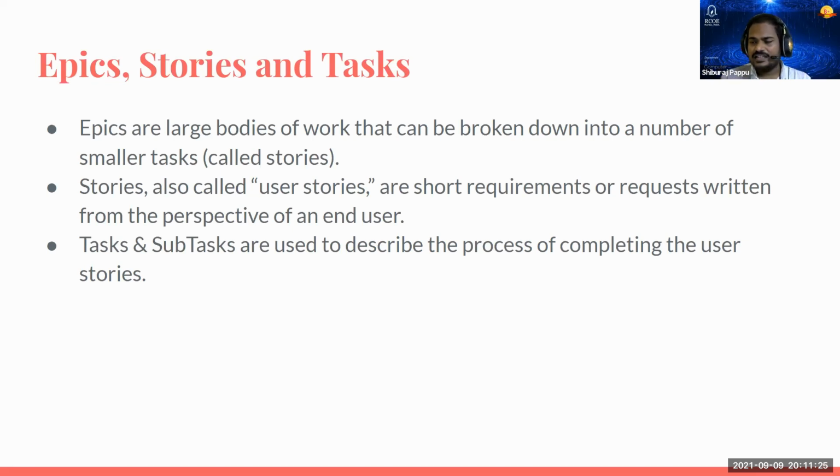After that, the third thing required is task and subtask. When you have a story, like user needs a registration form, can I directly just make a registration form? No, I need to have a database, an HTML form, CSS, and then it has to be connected. I need a PHP code which connects the database to the form. So every story will have tasks or subtasks. This is the hierarchy.